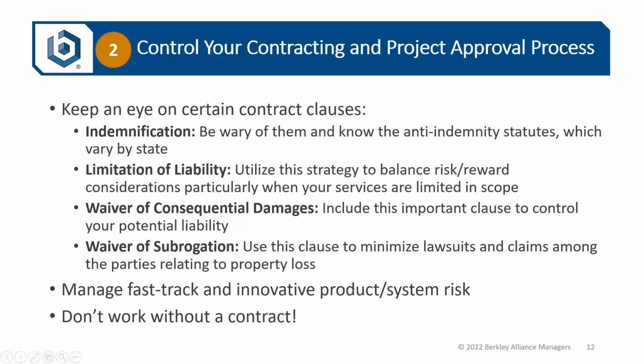So you don't anticipate those kinds of damages. You anticipate actual damages, but not the consequences, such as lost revenue, profit, reputation. Those can be astronomical. And so do your best to maintain those waivers of consequential damages in your construction contracts. We provide the same advice for design professionals.